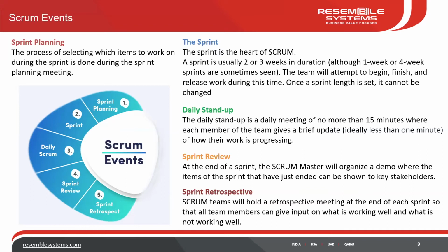Right, so sprint planning is basically where they plan. That's where the estimation happens, where they sit and see, okay, these are some tasks we've pulled out to do now. So what is the estimation? What is the time required to finish these tasks? All this discussion happens in the sprint meeting. Then the actual sprint. What is the actual sprint? The actual sprint is the time taken to complete those activities, to finish those tasks that have been taken from the product backlog.